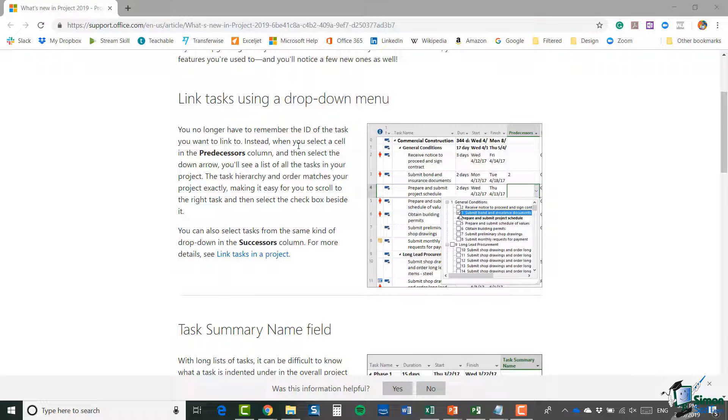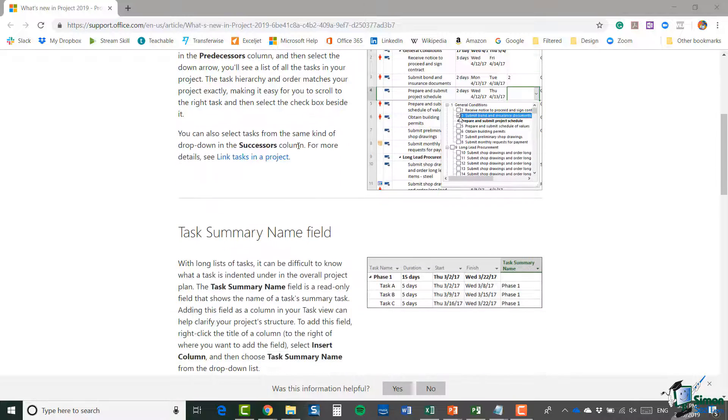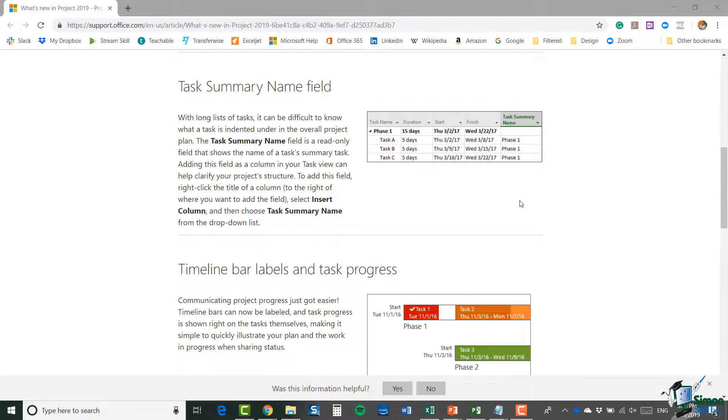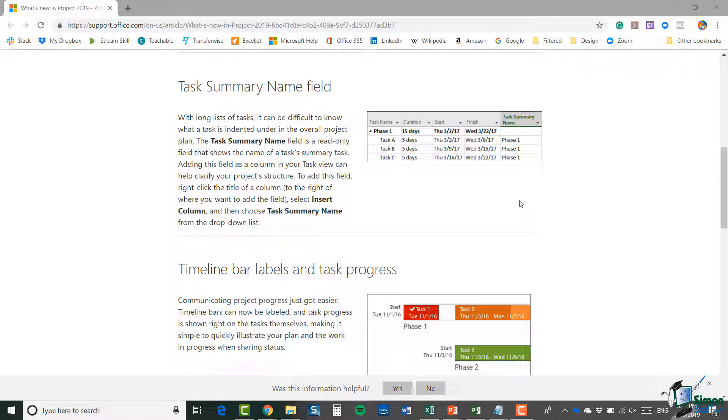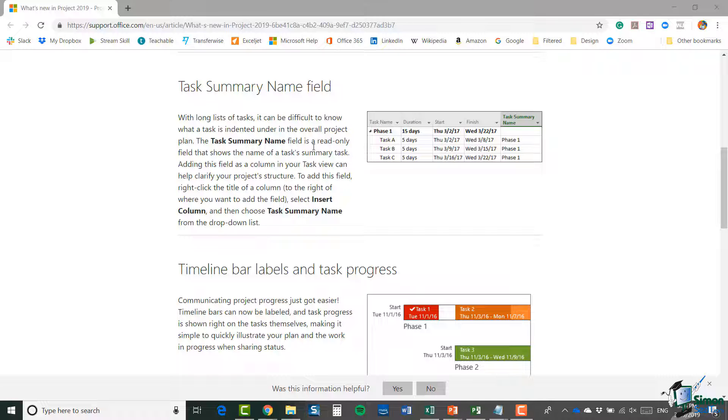with a long list of tasks it can be difficult to know what a task is indented under in the overall project plan. The task summary name field is a read-only field that shows the name of the task's summary task.